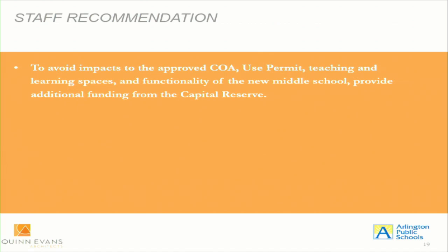So with all that considered, it is our staff recommendation to accept the low to no impact value engineering options and avoid any other impacts beyond that. So avoid the impacts to the COA, the use permit, and certainly the impacts to the teaching and learning environment, and to use additional funding from the capital reserve to make up the remaining gap. And now I'll turn it to Ms. Peterson.